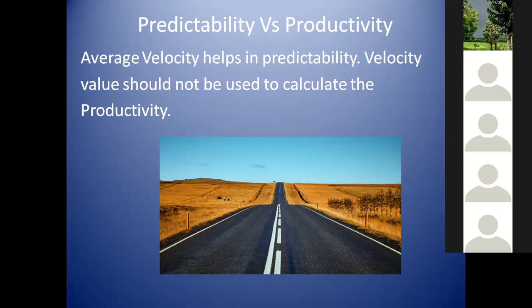Your team might achieve it in a different way, and they could complete the work in even 3 sprints. Or they can go beyond 5 and complete it in 7 sprints. But at least for a higher-level vision, for a plan to set the target date, you have this average velocity to come up with a figure like: on average, 5 sprints are required to cover these refined stories which are available with so and so story points.